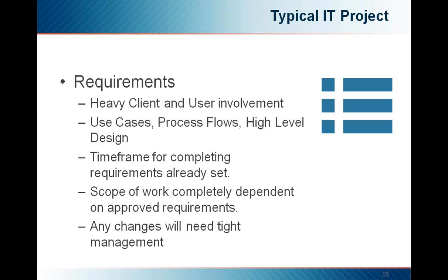So the timeline is planned in this phase as well, correct? We can't determine the schedule before we complete the requirements. Well, you're right, that would probably make sense, but in reality, the timeline was established prior to the requirements phase. The budget and schedule were completed in an earlier phase, so the requirements team is now heavily focused on completing the requirements document. We rely on user expertise to